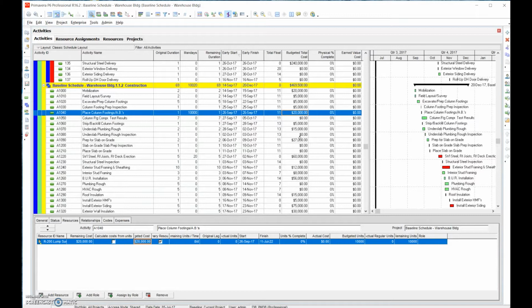And we're going to have to reasonably put together schedule values, and that's what this is: a schedule with values attached to it that we can bill the client. We're early on in construction, so that makes it tough. So you take your estimate and try to look at scope letters from subcontractors, and try to use best guess estimates. There's some guessing that has to take place in the very front end of this.